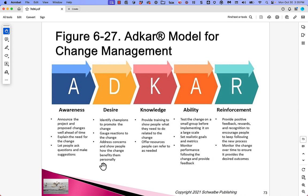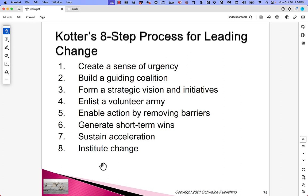The ADKAR model suggests people go through phases somewhat like the stages of grief: Awareness, Desire, Knowledge, Ability, and Reinforcement. Kotter's eight-step process is: (1) create a sense of urgency, (2) build a guiding coalition, (3) form a strategic vision and initiatives, (4) enlist a volunteer army, (5) enable action by removing barriers, (6) generate short-term wins, (7) sustain acceleration, and (8) institute change. The key idea is that change doesn't just happen — you can't dump whatever the project created on the organization and expect it to be successful. It has to be thoughtful and hands-on.